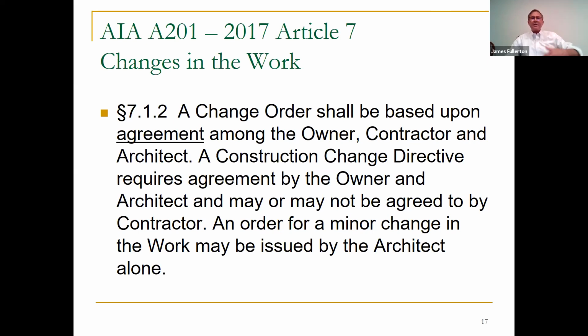In other words, it's like you've already given your notice of your claim. You don't have to give any further notice. The owner and architect are giving you the claim notice before you even start. There's also such a thing as a minor change in the AIA documents. That means no impact on time or schedule. If there is an impact on the schedule or the price, it is not a minor change.